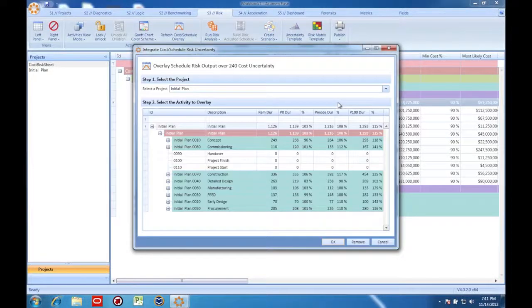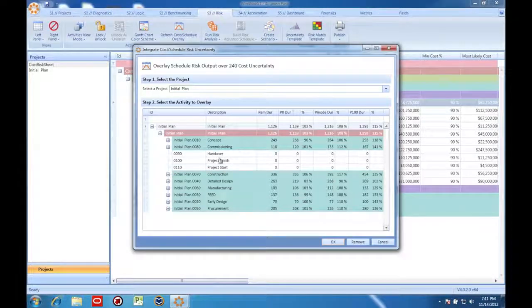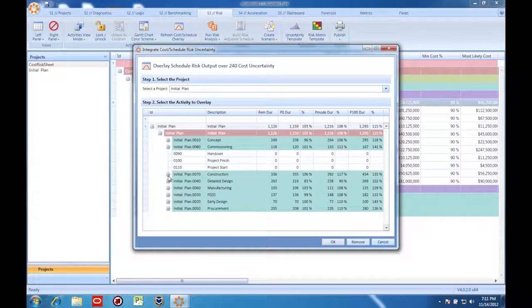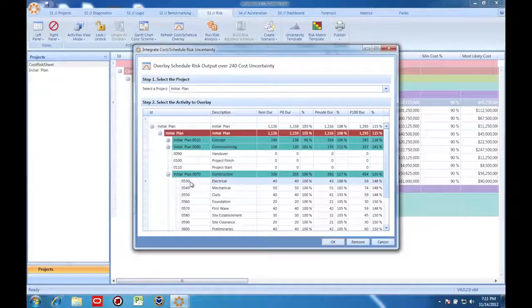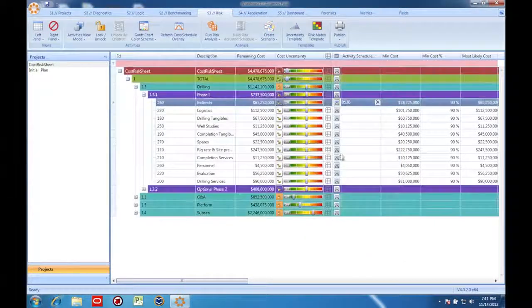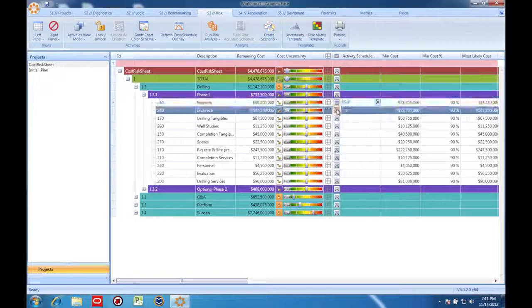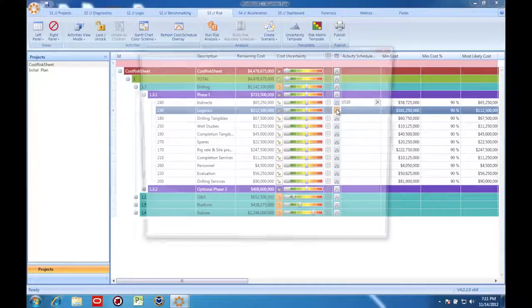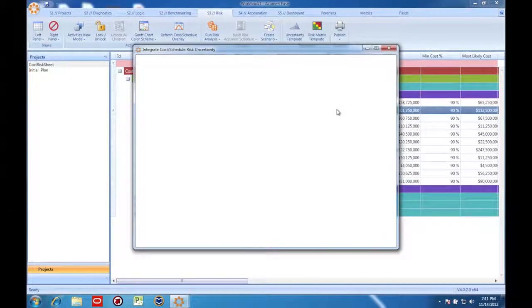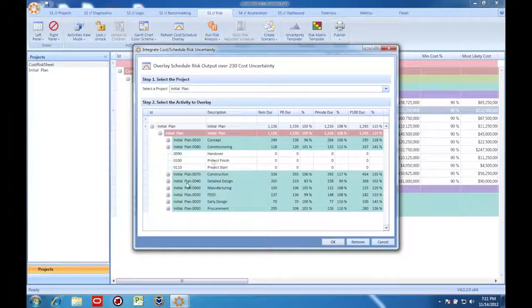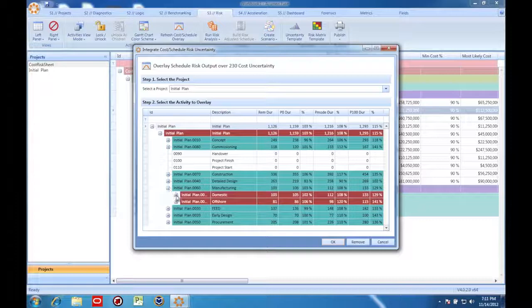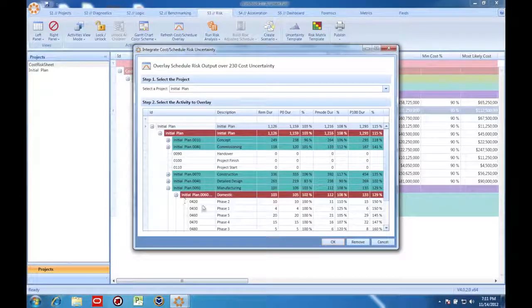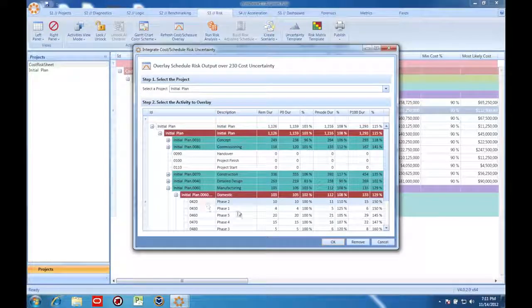With these, I can map these tasks in the cost model to tasks in the schedule. In fact, they don't even need to be the same task. Acumen Risk is going to track which ID in the schedule maps to which activity in the cost model.